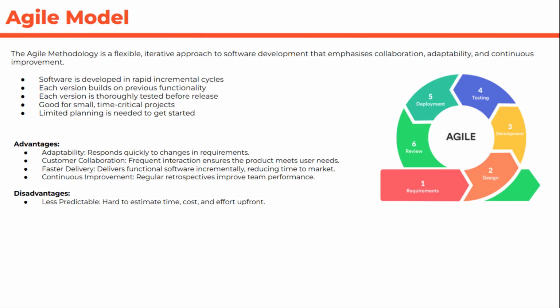Well, it's less predictable. If you came to me and said, John, I want you to create the software and how much it's going to cost and how long it's going to take, if I was doing an agile model, I'd say I have absolutely no idea. No idea. But we'll start and we'll charge on a monthly basis, for example. It's hard to estimate the cost, the time and effort up front. We'll do that as we go.